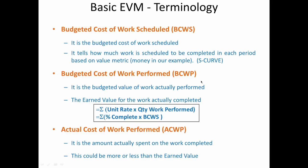Budgeted cost of work performed (BCWP) is the earned value, obtained by multiplying unit rate by quantity of work performed. Alternatively, percentage complete multiplied by BCWS also gives the earned value at that update. Actual cost of work performed (ACWP) is obtained from the accounts — what is maintained in terms of actual cash spent.